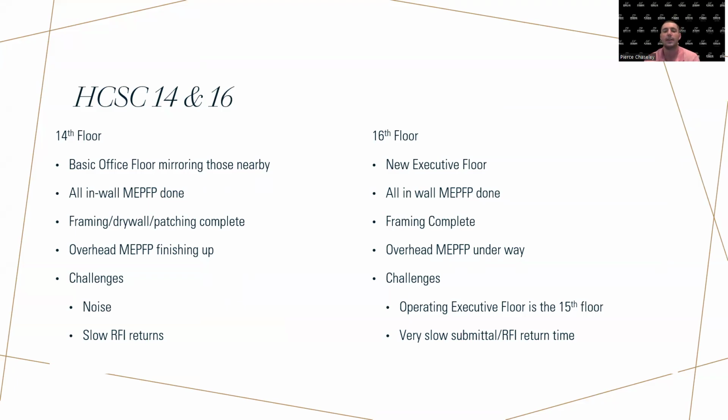Obviously, if an employee fills out a noise complaint, that's one thing. But when the CEO of a company like HCSC is filling out a noise complaint and calling a superintendent, that's a whole other thing. And then very slow submittal and RFI return times. The main architect on the job had a 4-week vacation in the middle of the summer. And on interiors projects that only last a couple months, 4 weeks is a substantial amount of time, and made getting questions asked and submittals returned very difficult for both the 14th, 16th, and then also 41 and 42 project.